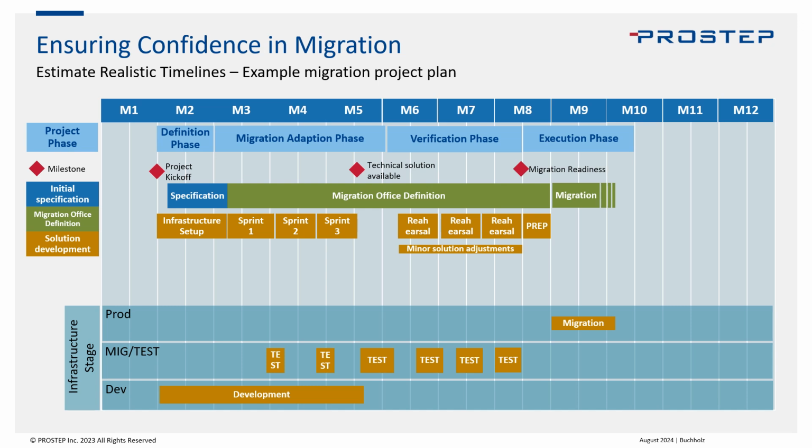Rehearsal testing means you take the full database, do a complete migration, and see whether this works out from the performance point of view, but also whether you missed any data conditions that need to be handled inside the migration pipeline. Furthermore, you're validating the complete end-to-end system stability with this approach.